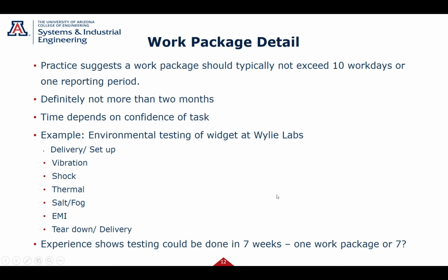So do you do 1 work package for 7 weeks? You could, but then if you're halfway through, so week 3.5, and you ask the engineer where he or she is, they're going to go, well, I think I'm about 50% of the way through, so we're good. Are you okay with that? Well, if you trust this engineer, maybe. But if not, and I just did 7 weeks because, look, I have 7 tasks here. Let's just pretend all these were a week task.